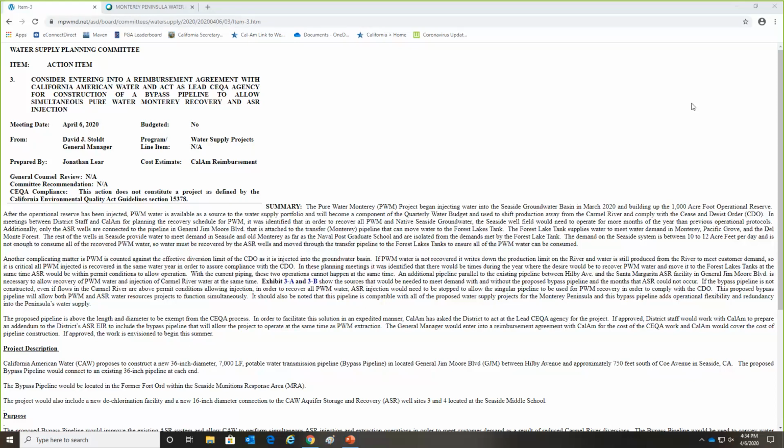Yeah, I think what I heard, Ian, didn't you characterize this, this is Dave speaking, as part of the Monterey Peninsula Water Supply Project that was approved in September of 2018? That's right, so it's already deemed approved. There's no additional application. There will just be an advice letter that would go into effect once the project comes online, and any other components that we built on the water supply project, like the Carmel Valley pump station.